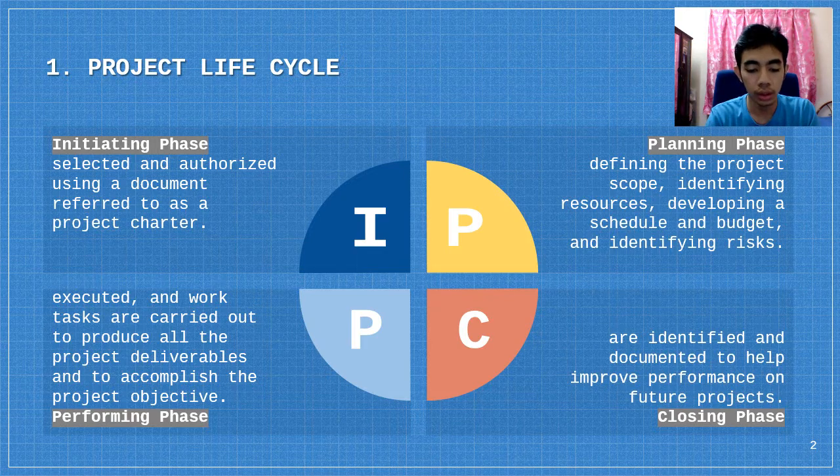It includes a variety of actions such as collecting and making final payment, staff recognition and evaluation, conducting a post-project evaluation, documenting lessons learned, archiving project documents, using a knowledge base to record lessons learned and post-project evaluation. A knowledge base is helpful to retrieve lessons and information that can help with doing business with the customer or other customers in the future.